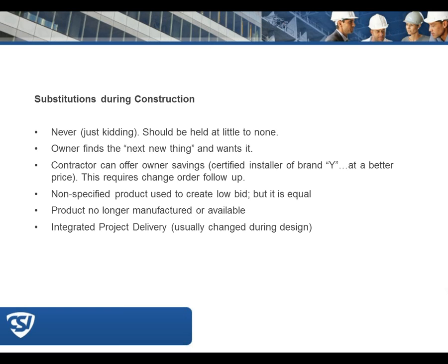And that's why I had Jim review all those certifications on the CSI form. That is one thing that the contractor is certifying that he has checked, and he should check before he submits the substitution request. And I would say if you've used that form, and if they have properly filled it out and signed it, and it's the basis of this change, then I think you've got a good spot to go back and say, you're going to have to figure out a way for this to work because you certified that it would. Yes.